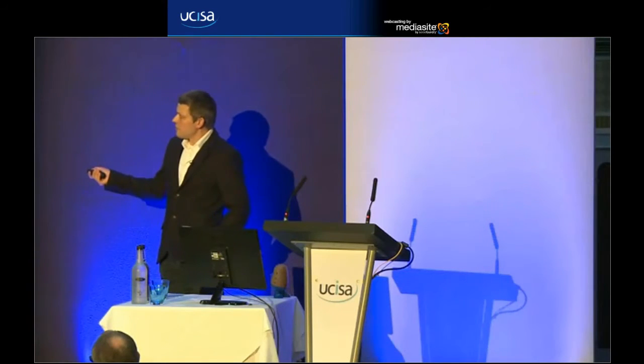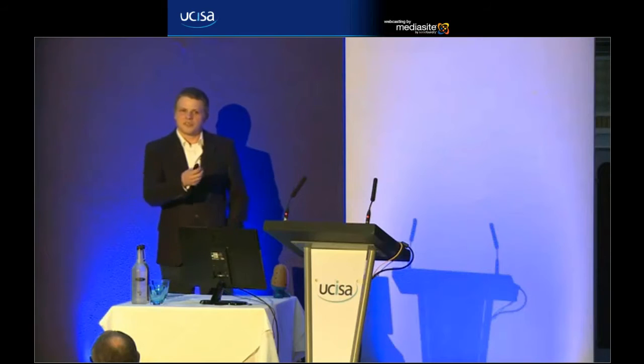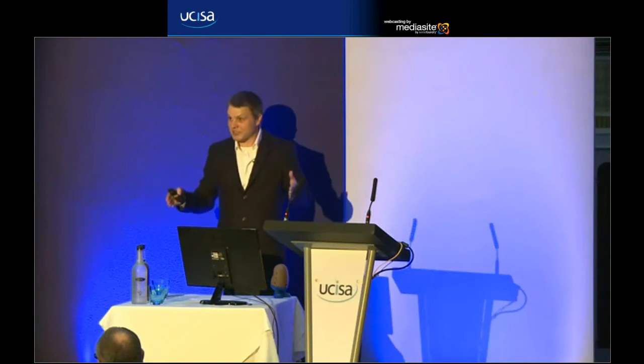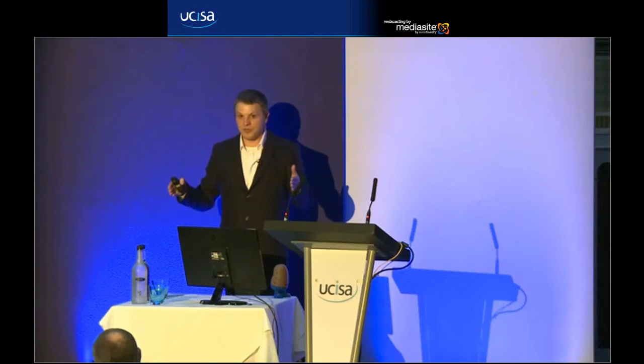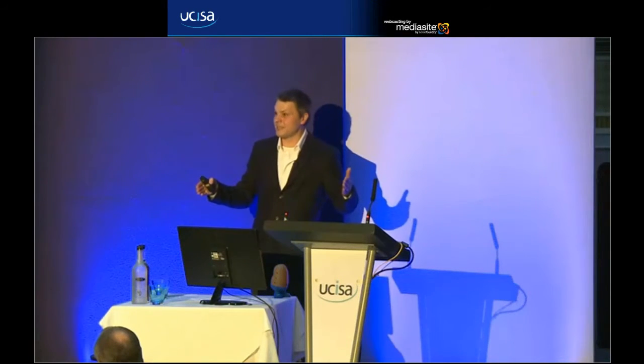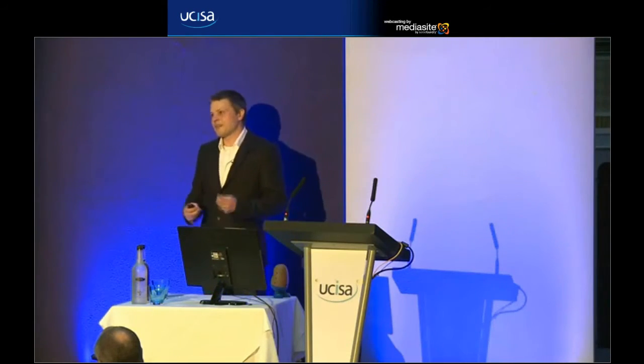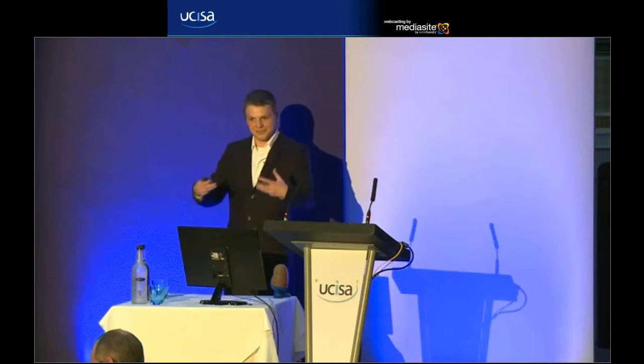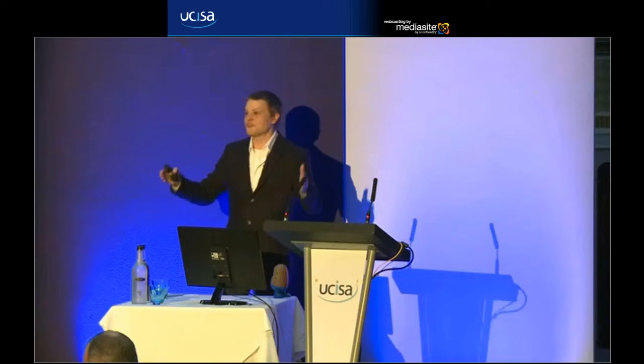There are a couple of points in there where we've gone up a little bit. This is where maybe somebody has added in an additional requirement mid-iteration. We do try to avoid that, because the team have committed to deliver this piece of work in that 3-week period, and they commit to that at the beginning. So we try to protect the team from people saying, oh, well, can you do this as well at the same time? Can you do this? Because that then spoils the effective contract that we've got to deliver what we said we're going to deliver.